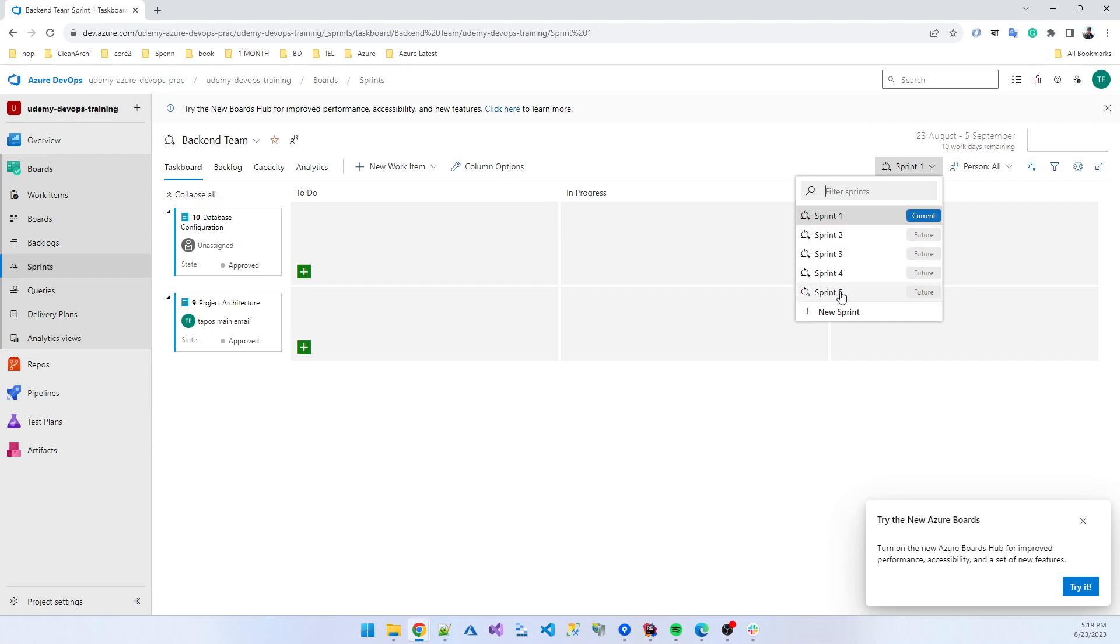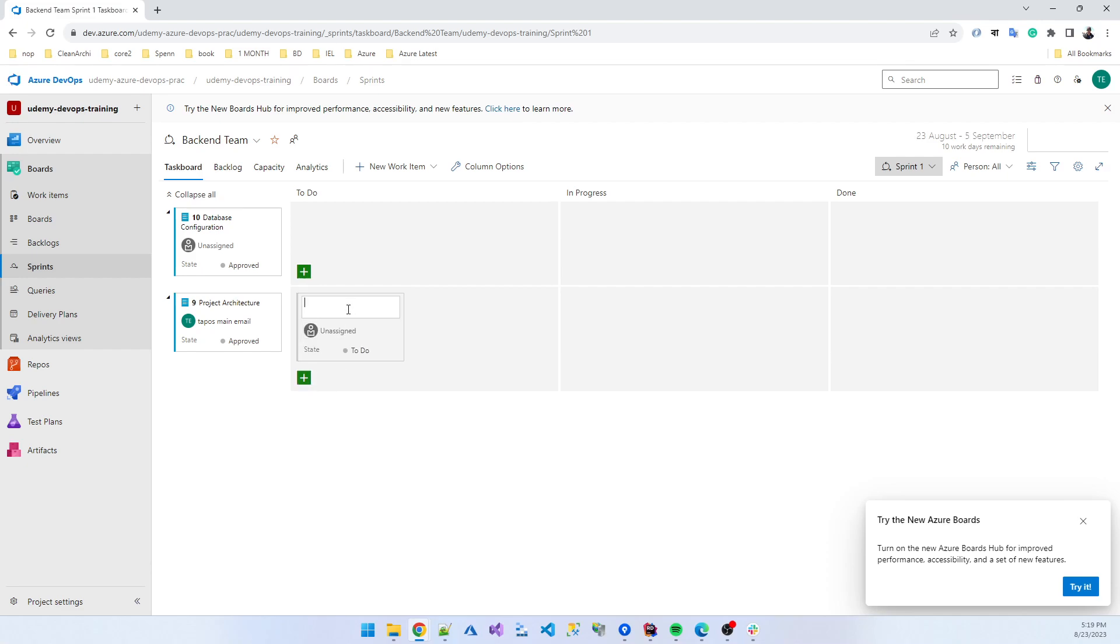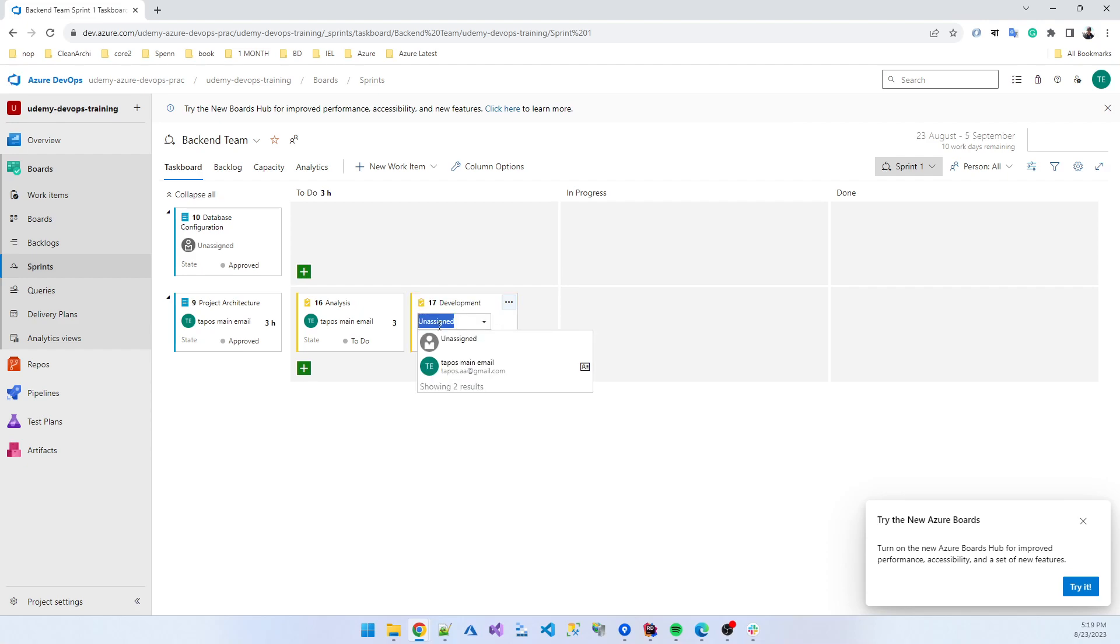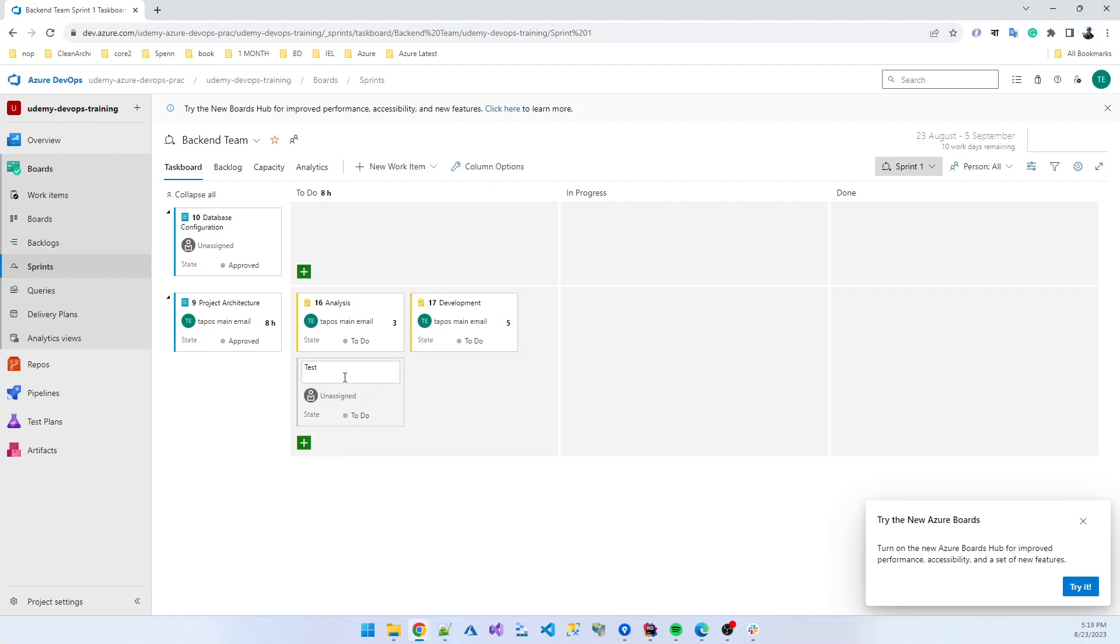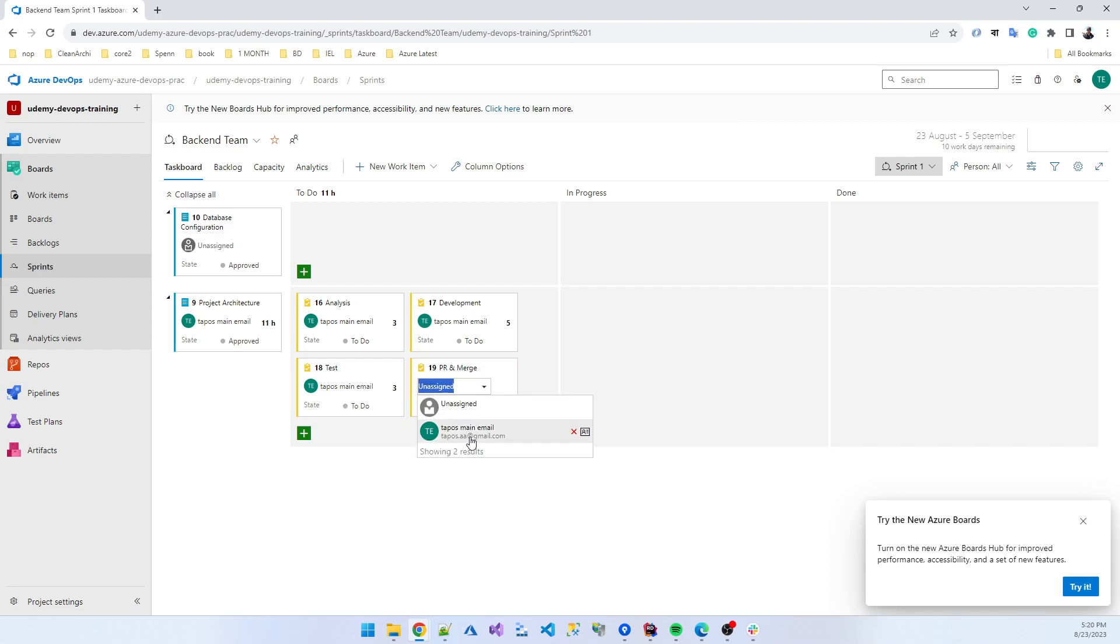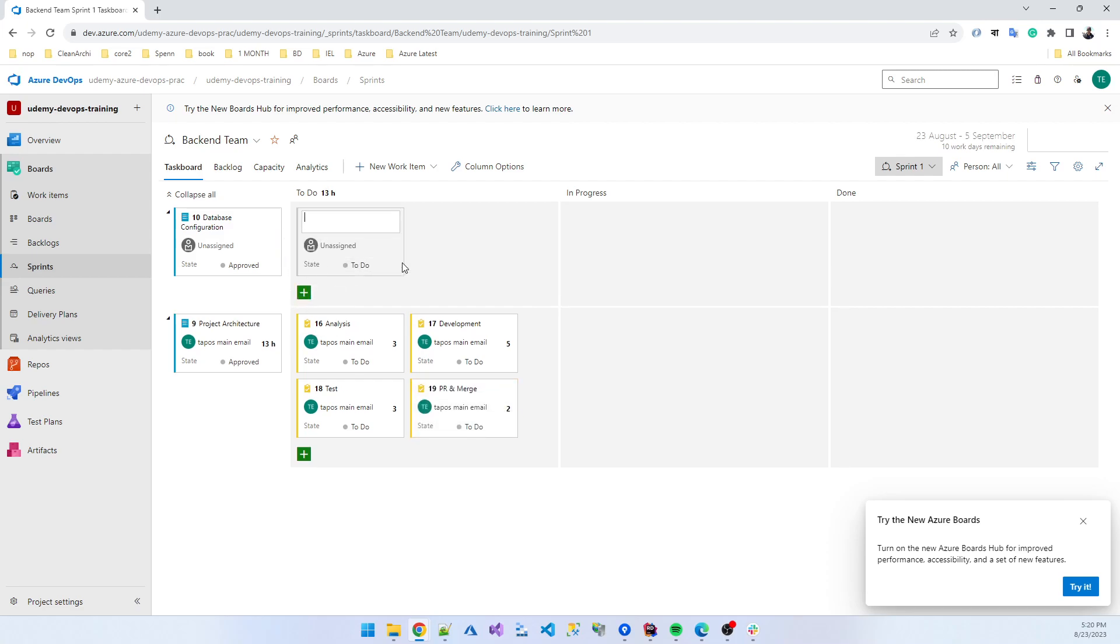Okay, these two jobs are assigned for me and you can also check that sprint one is the current sprint and these are the upcoming sprints. So first you need to subtask your item. Suppose analysis is assigned to me, it needs three hours, then development, suppose five hours, then we test this feature, it also needs three hours, and then PR craft and merge in the branch, so this also needs some time, suppose two hours.